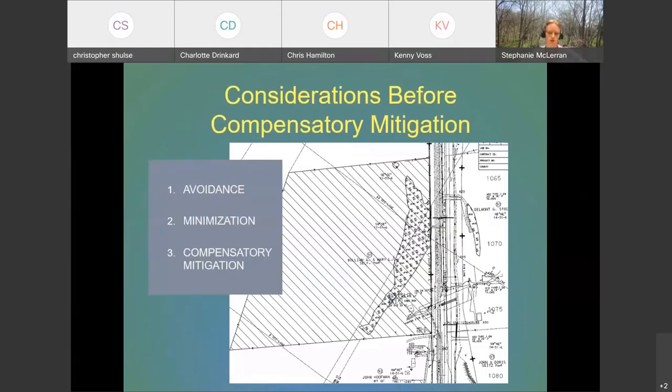This was Route 67 corridor in Southeast District. In the area of the project, there was actually a rare type of wetland known as a fen wetland. So the initial preferred alignment was actually right through the wetland, but because it would have had so much impact, it would have cost so much money for mitigation. There's an endangered species that is known to use this type of wetland.